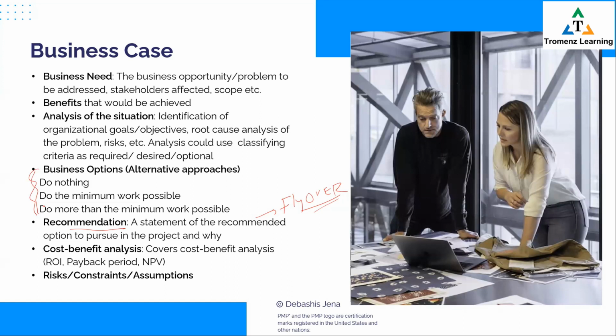Okay. The next section, cost benefit analysis, as the name suggests. Here it is straightforward. We're talking about the profitability of the project. We compare what is the investment versus what is the returns. So we're going to put it in financial terms. Use any of the metrics you want. Use ROI, payback, NPV, any financial metric, up to you. Like I said, ROI of the project would be 30%. Or somebody said net profitability of the project would be this many billions.